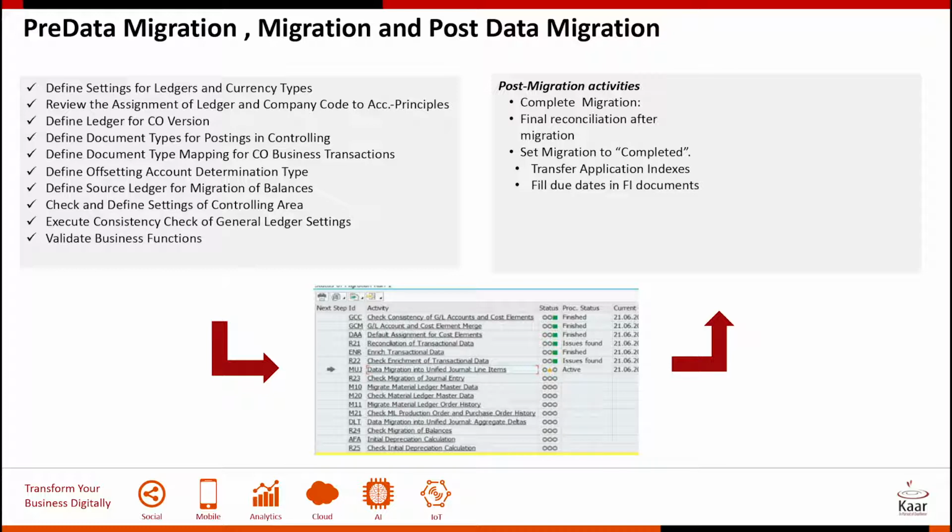So this is a very long drawn process, and this is one process which customers would not have experienced in EHP upgrades. So when you run this several times during your mock conversions, it becomes very clear that you're able to optimize the time, and you're able to run this in parallel processes depending on the power of your HANA database. And the one thing that is important is these will have to be run in sequence. So if you get stuck, you'll have to solve that issue.